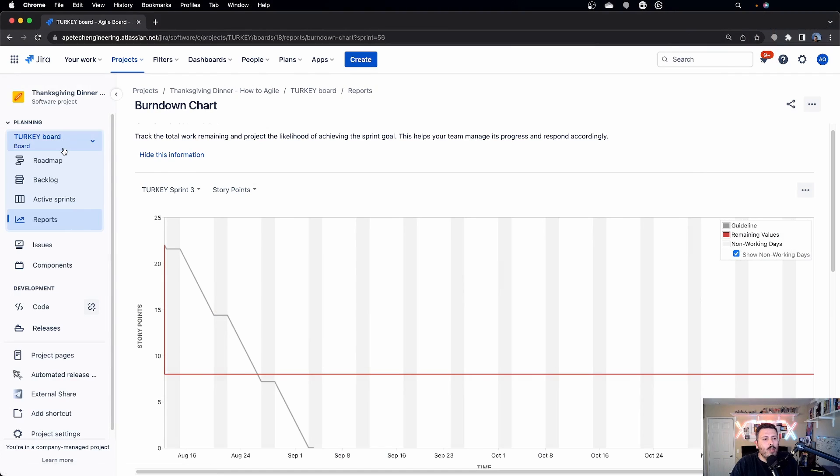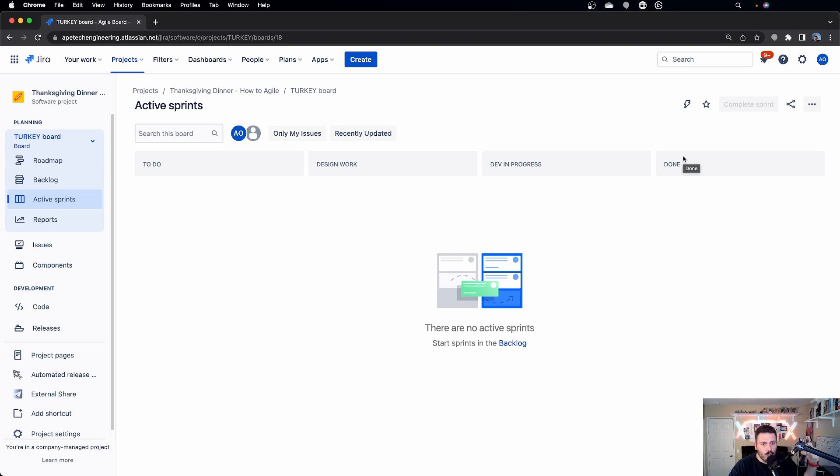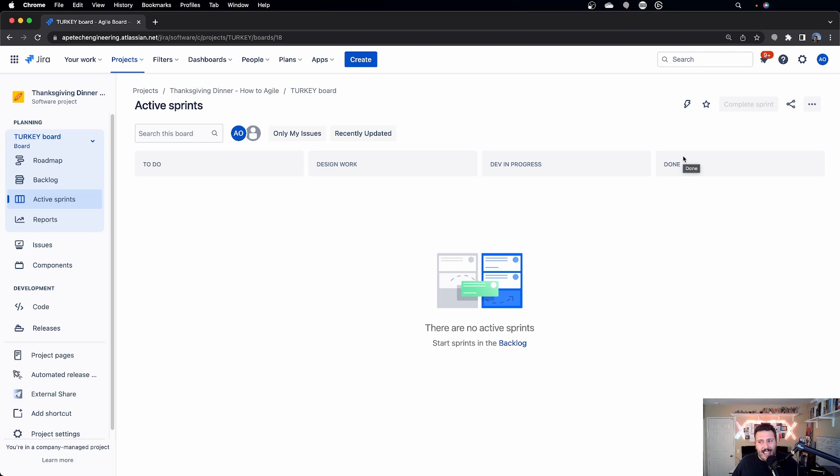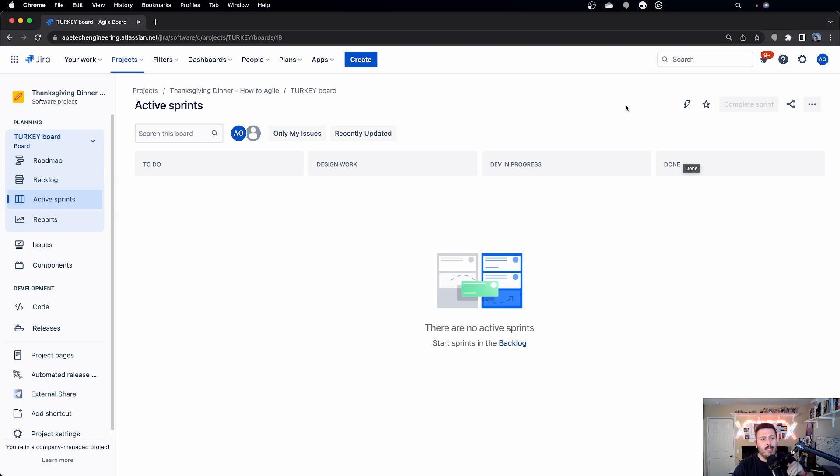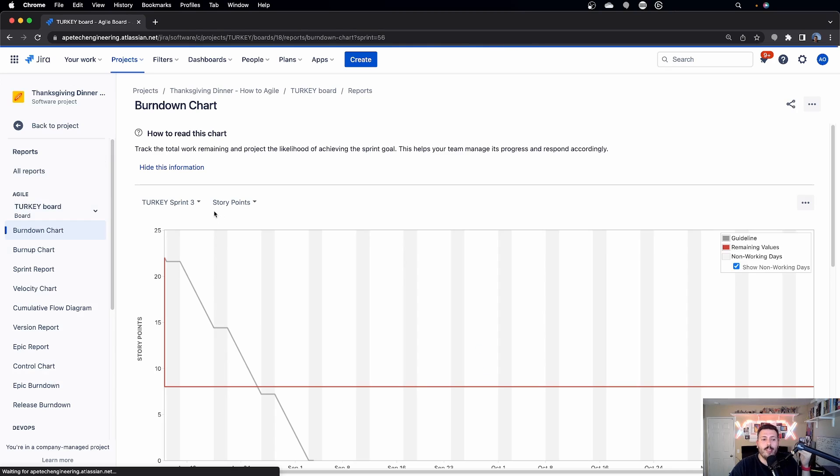Now, I do want to give you a little tip here as to what constitutes closing something out because you would be surprised. The issue doesn't have to be resolved and the issue doesn't even need to be in a done status for it to give you credit, for it to take the dip. And so what Jira is doing, and again, this is the stuff that you only learn here, what Jira is doing behind the scenes is so when you're looking at the columns from your sprint, whatever is in the farthest most right column, if your issue, your story, your task, your bug, whatever you're working on, if it actually makes it to that done column, then Jira is going to register it as a completed item from the burndown perspective and give you credit. So if something makes it all the way across, then that report is going to take a dip. It's going to do what Jira calls a burndown. So this is good. This is how you go from up top down some points. The intensity of which that line is going to drop is dependent on how many points got closed out in that issue. So if you knocked out a 20-pointer, then it's going to go down 20 points. If you knock down a one point, it's just going to go down once. The line's not going to go as intense.